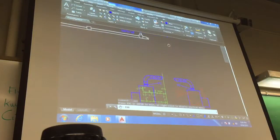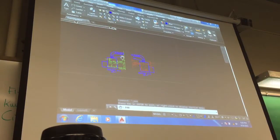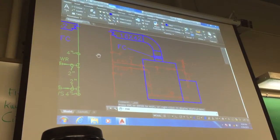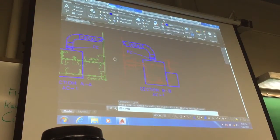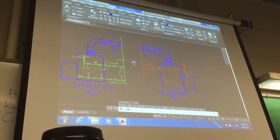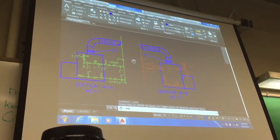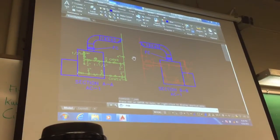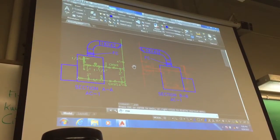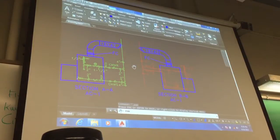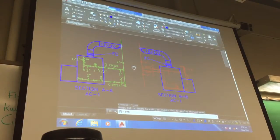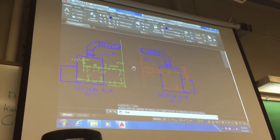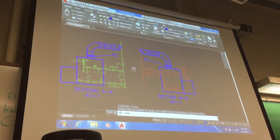And down here, you'll get plan and elevation views of the mechanical equipment room, two elevation views of the mechanical equipment room, with all the pipe and fittings. Some of the fittings I'll give you the numbers, a few of them you'll have to determine, such as thermometers and things like that, some of the unions and things like that, you'll have to pick out the numbers. Strainers, ball valves, that type of stuff. Pick out selected items in there.